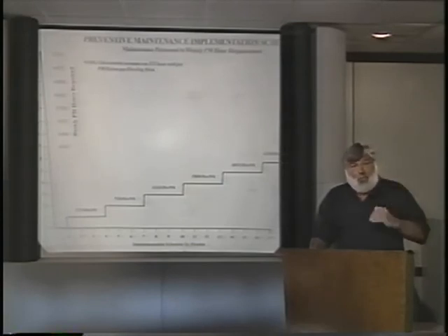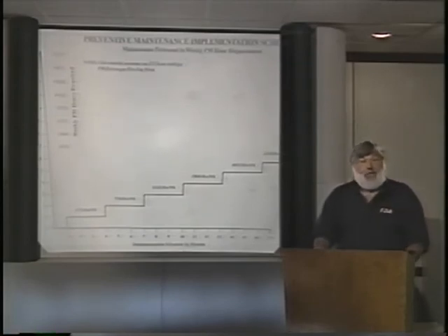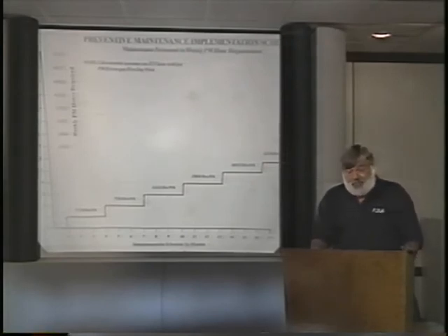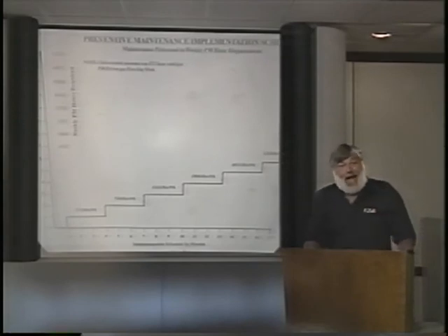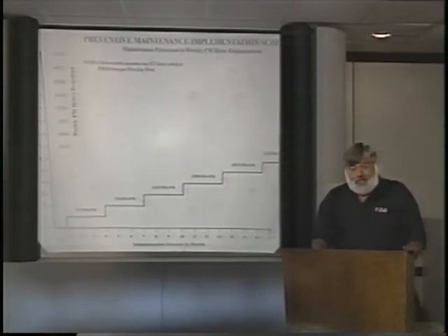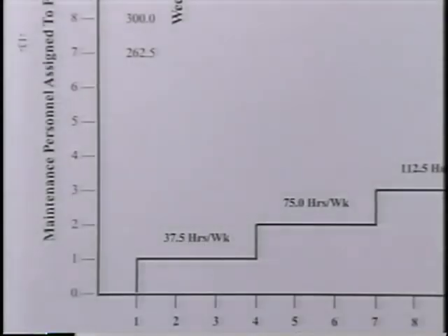If I want to lower that utilization factor down to 45 to 50%, as we talked about in craft capacity planning, then I'm going to drop the number of PM hours that are required. If I put a second person on PM, that means I have to generate 75 hours of work per week for those two people.